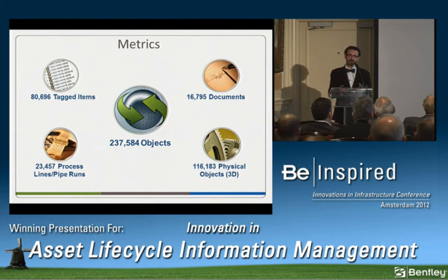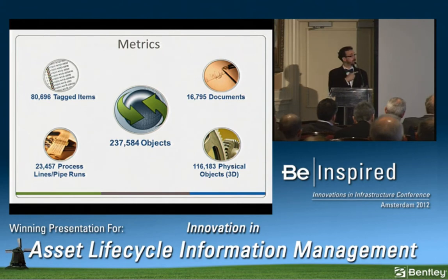That works to about 137,000 work hours. I'm going to break that down to minutes because minutes are important to me. That's 11.2 million minutes approximately. All right, and the reason I say it's 11.2 million minutes is because if they're going to touch 150,000 assets, that means they're going to be spending approximately 75 minutes per asset. All right. What if we can reduce that? And we have reduced that by a minimum of 20% by employing the techniques I just described. That's taking the time down from 75 minutes to 60 minutes per asset on average.